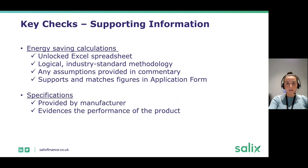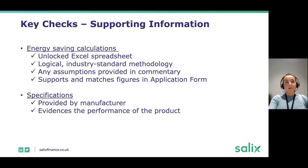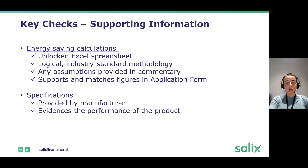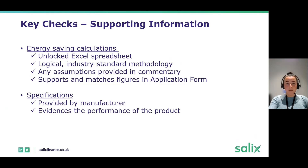Regarding energy saving calculations, ideally these are in an unlocked Excel spreadsheet so we can track the methodology and assumptions used. We expect logical industry-standard methodology with assumptions provided in commentary, and the calculations should support the figures used in the application form as an evidential basis. Specifications should be provided by the manufacturer and evidence the product's performance — for example, if you're providing updated heat pump calculations, we'd expect the SCOP to match what the data sheet specifies.